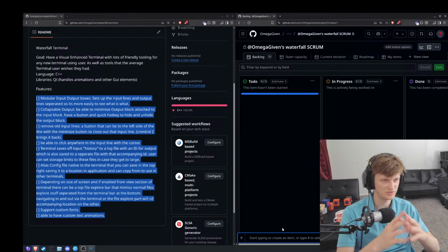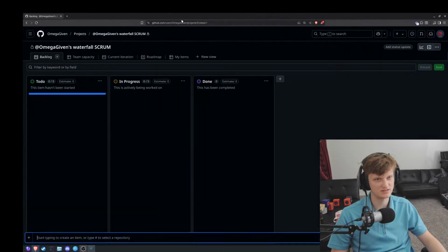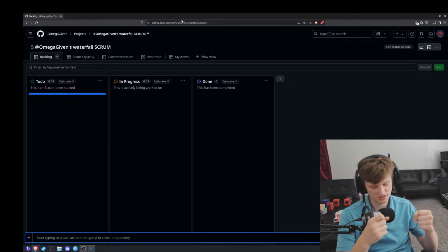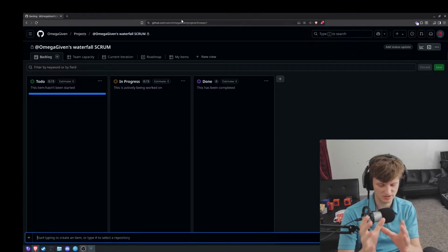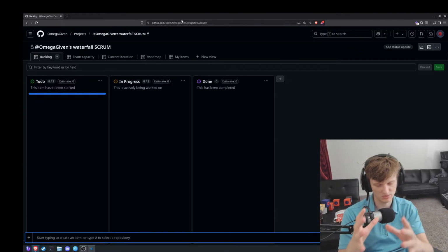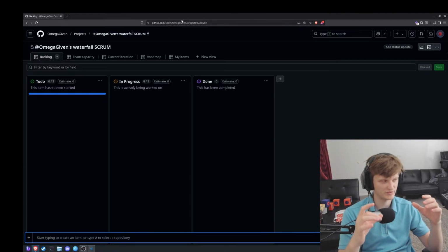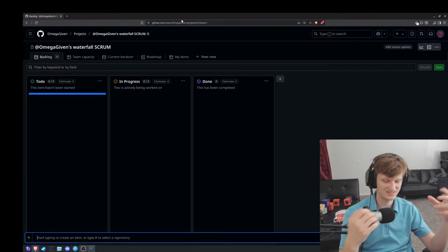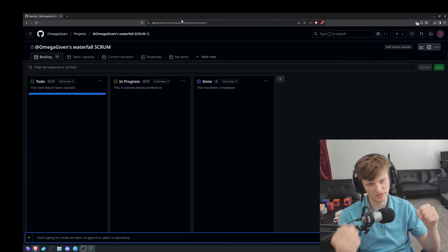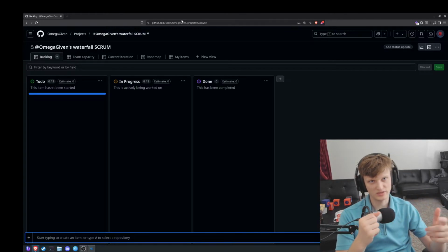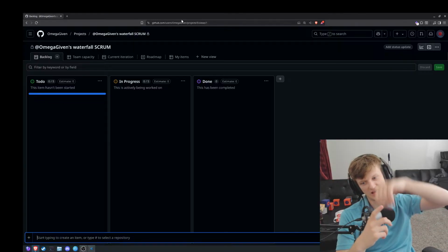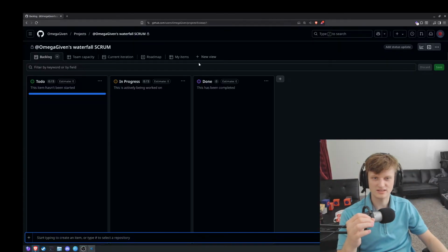Yeah, I'm wondering if we do need to use Jira. I don't know if this will actually work, because if we're going to split our projects into sections where we have the GUI interface and the back end of the C++ terminal interface or terminal modules, I think that's a better term for them, they need to communicate with each other, but they're technically separate. Our GUI and our back end are pretty separate. We can split those into epics. So GUI will have lots of items built into it, so we need to have the items stored in an epic of some sort. I feel like that's how we need to do this.